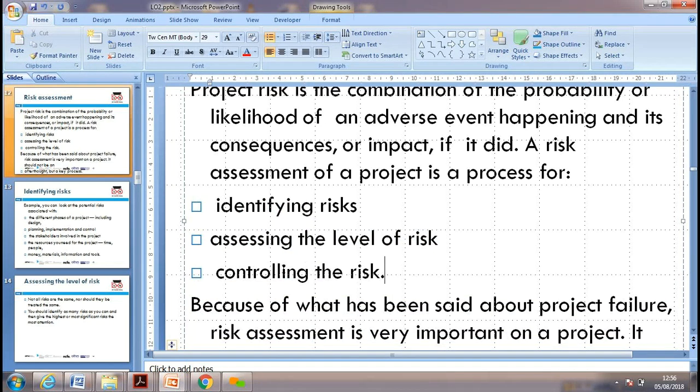Can we totally minimize risk? I don't think we can completely eliminate it, but we can, of course, take precautions to control the risk. We can also transfer the risk. If we buy insurance, maybe the insurance company can bear the risk. So we can eliminate the risk or we can minimize the risk, but we can't be 100% risk free.